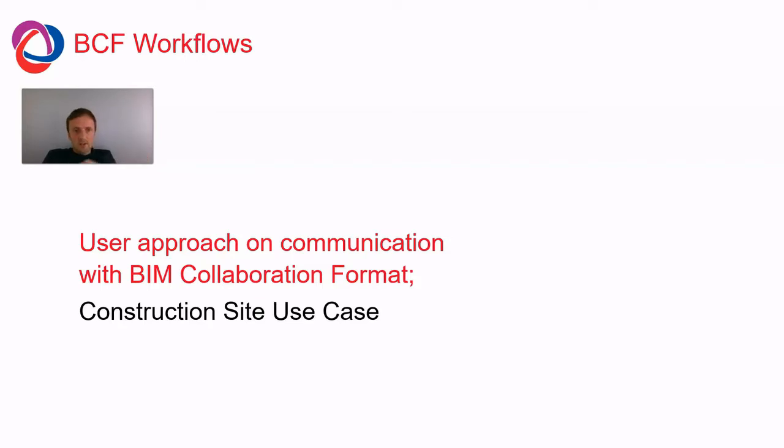And now we can actually do the same. The picture is there, right? He took the picture with his camera, but also the line that would be his description in the email is now the description in the communication package, and he wants someone else to respond quickly, and that's how we do it. Communication in BCF has a due date. So set a due date.